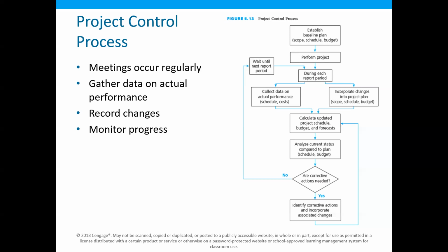So why do we need the late start and finish? We need the late start and finish because these are the limits on the start and finish times of the activities. The early start time is the earliest an activity can be started. The late start is the latest an activity can be started without delaying the project.